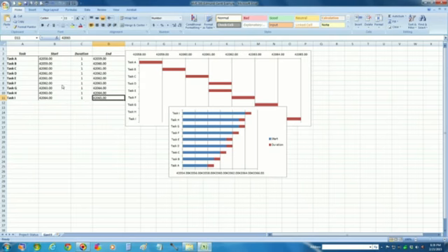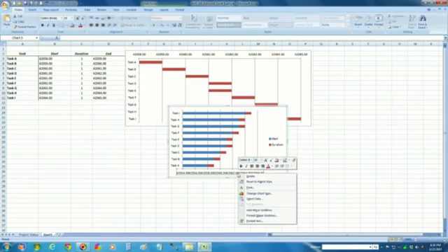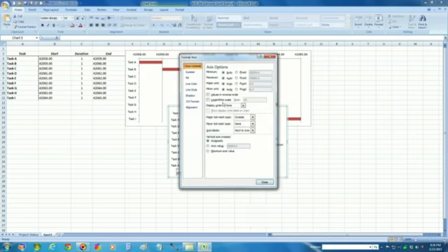Once I do that, I'm going to right click on that axis and go down to the bottom where it says Format Axis. Right here under Axis Options, my minimum needs to be my start date, so I'm going to change that to fixed. Right now it's 42,054. I need it to be 42,058. Just below that is the maximum axis option. That's going to be fixed too, to the longest duration for this project, which was 42,065, my end date. It's 66 right now. I'm going to change that to 65 and then hit close.